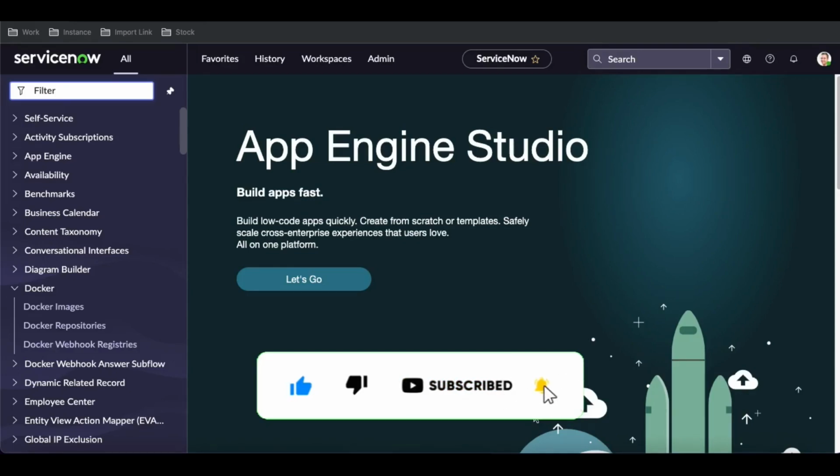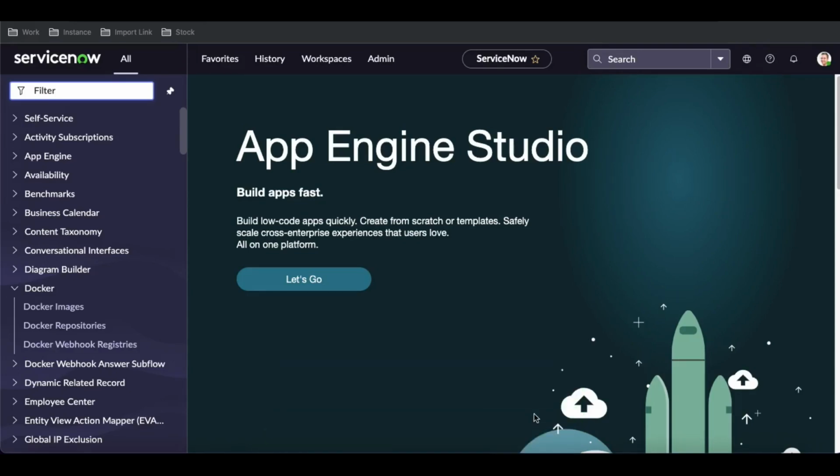So what is unified backlog and how useful is the unified backlog? Let's say that in your current situation, it can create an incident, in some cases it can create a defect, and all these can be converted to a story. Let's say you got an incident from your customer, and then that can potentially be converted to a story, because that incident is because of some development work, and that is actually an issue for your platform. So you can convert this incident to a story, and you can manage it from the unified backlog.